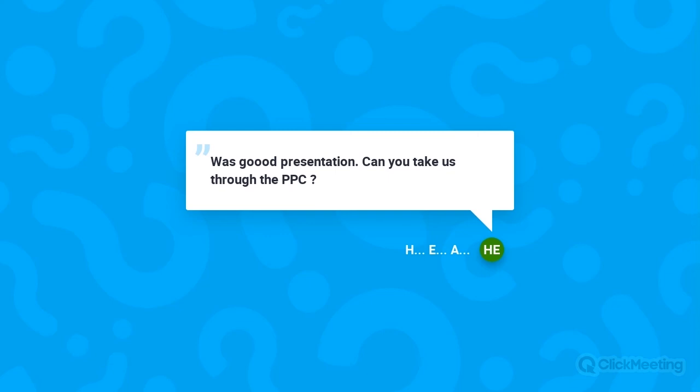So let's say, for example, we've got next week 10 activities, and only 5 of those finished. PPC would be 50%. If I finished activities the week before or the week after, they will be unsuccessful and won't contribute to PPC, so PPC will be low. So it's a measure of how good your short-term planning is.